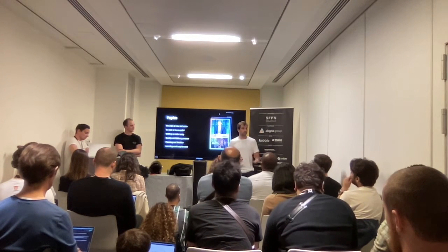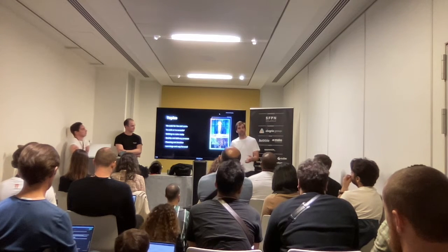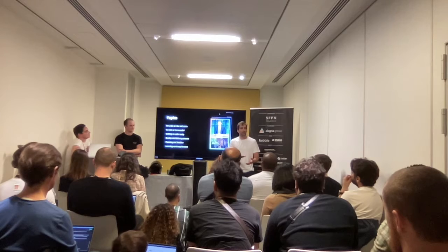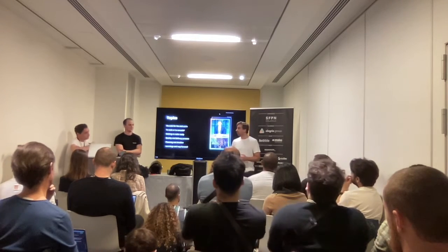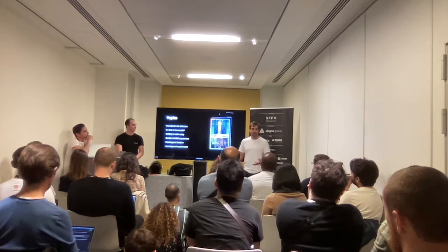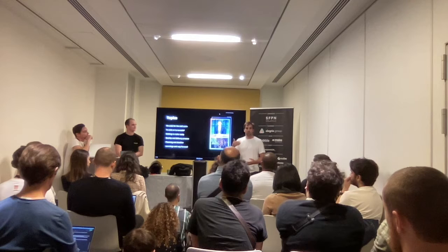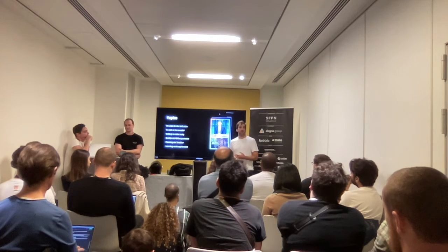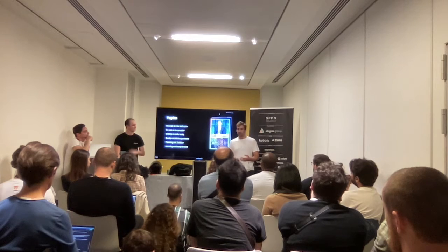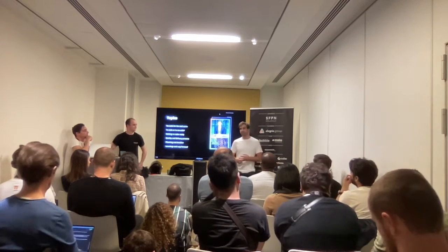It's up to you to follow it or not. You can get out of the standard, but it's better to get out of it knowing what the standard is and what the best way to do something is. Also, the standard evolves over time. For each issue we face, we ask how we can fix the root cause so that the next time we won't face the same issue, and then I put the finding in the standard so I can share it with everyone else.